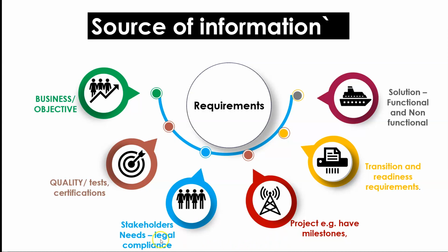What about stakeholder requirements? And remember, government is a stakeholder in every project. So whatever project you have, you have to ask yourself, what government agency will have legal or regulatory or whatever requirements that I have to comply with. You have to have the listing of your main stakeholders and what are their requirements. Because as you go through the project and you try to change, there are some things that you cannot remove. So you should do that kind of analysis.